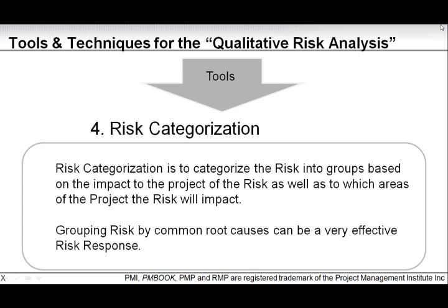So if you have a group of risks that are team, technical or process related, then you will group the risks into whatever grouping you decide, and you might make a secondary grouping which is based on the root causes. These risks originate from whatever the root cause might be, for example a technical design.